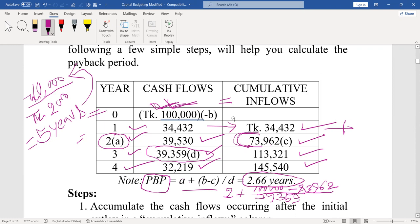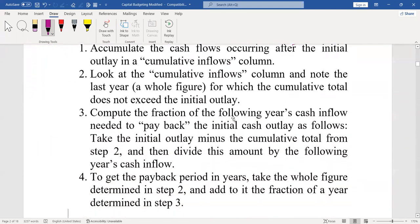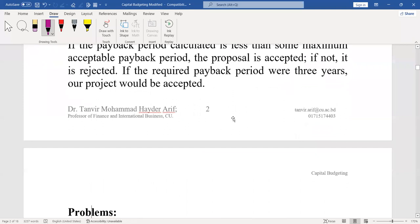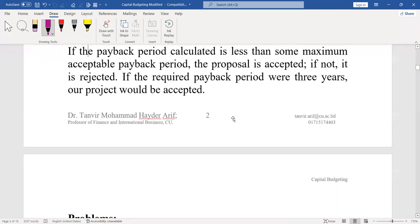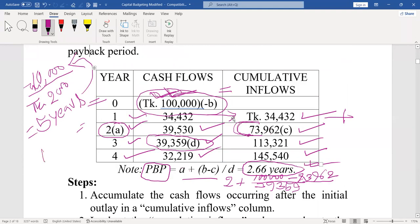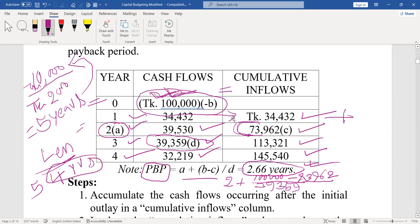So if you invest Taka one lakh in this project, you will get your money back at 2.66 years. This is the payback period of this project. When we have to accept a project — if you have two or three projects — if one has a payback period of five years and another has four years, you will accept the project with four years, since the payback period is less.